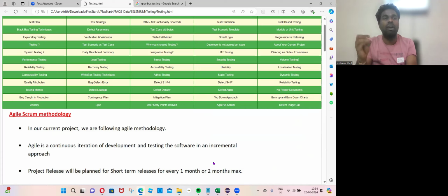How the release went well, what problems were faced, what challenges were faced, how we can do better for the next sprint. In this kind of forum, all the BA, design, and development teams, everybody will join the retrospective meeting. That will be documented and shared with everyone, so that the best lessons can be implemented for future releases. It is a release feedback session.